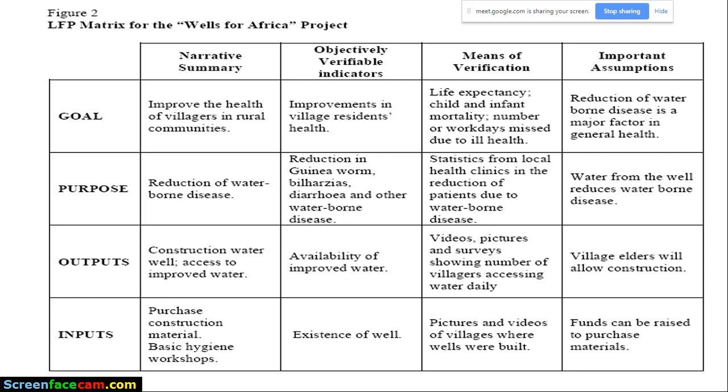Something I want to bring to your attention is that setting up a fully functioning monitoring and evaluation system is very costly. And no wonder it is called a system. It has components working independently, but for a common purpose. Are we together? For any project, M&E is non-negotiable. If you are dealing with a policy or a program, M&E is supposed to be embedded within it. And the minimum amount that you can allocate to monitoring and evaluation activity is 15% of your total budget. You see that monitoring and evaluation is very important.